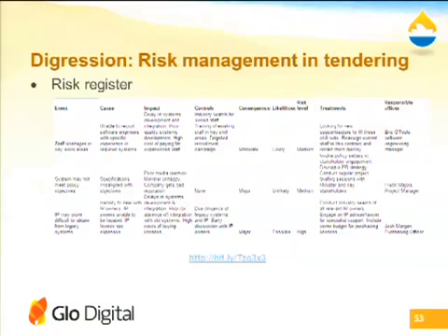The most important thing is the risk register, which is really to define all the things that could go wrong, work out how important they are or how severe they're going to be, and tell us how you're going to mitigate those risks. And if you don't do that, and one of your competitors does, they will assume the worst of your ability to cope with those risks because you haven't addressed them.